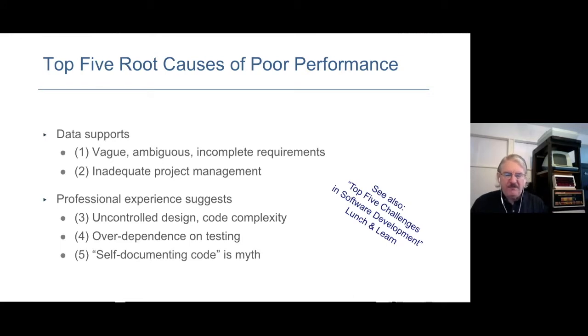A fair amount of the time it's not the number one problem, but only 5% of the time is it not even mentioned as a problem. Now, 39% of the time, inadequate project management, lack of planning, lack of tracking, lack of risk management, lack of change control, all of those kind of things rolled up there. 39% of the time, that's labeled as the number one problem on software projects, and only 4% of the time is it not mentioned as a problem. So again, there's real live data here that tracks back over about 20 years from various sources that supports those.